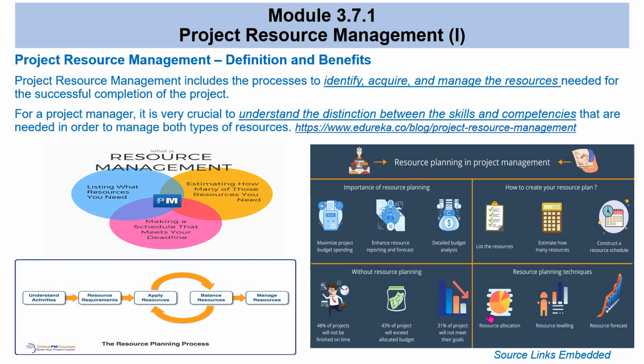There are also many ways of doing resource allocation, which you can learn separately: first forecasting, and if that is not enough, you can do resource leveling by distributing and seeing what happens, and reallocation as well.